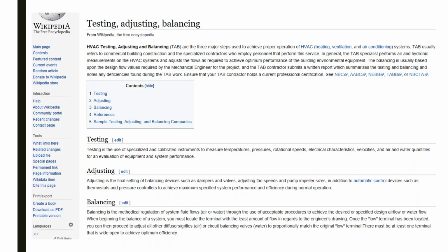And so they're doing it to themselves without knowing that they're actually having a major effect on the energy use in the building, just because they missed one part, and that was test and balance. They had to set that controller up. If they got the information right there, it's on the box or it's on the prints, but they just didn't do it. So yes, if you don't know what you're going to set it up to, that's going to make a major impact. This goes back to the design, whether you accept the design or not as effective.